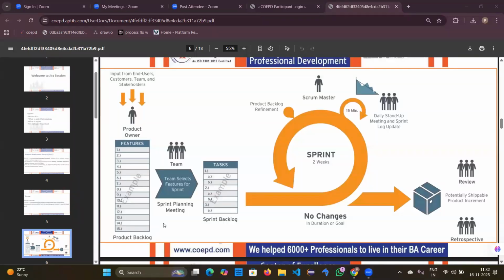As we discussed the technique for the BV, here also there is a technique named the Fibonacci series. With the help of these Fibonacci series numbers, the developers will be giving those CP values. The Fibonacci series is a series of numbers where the next number of the series is the sum of the previous two numbers.